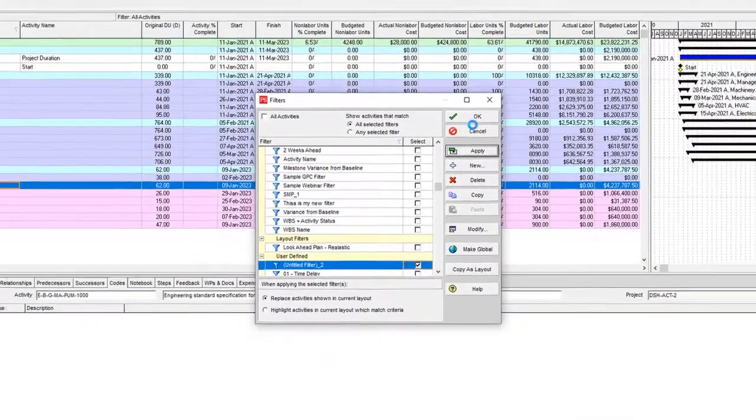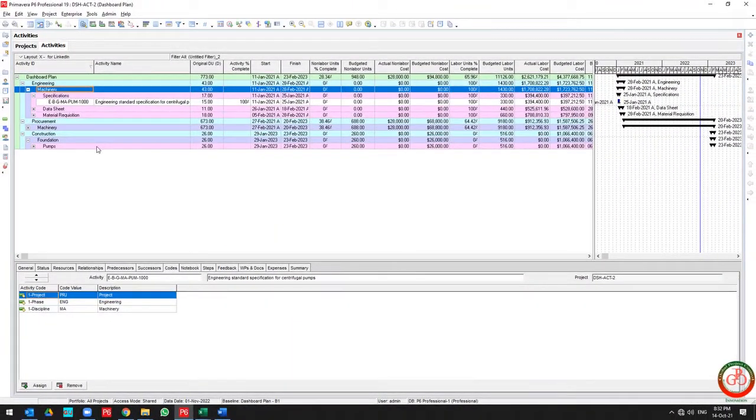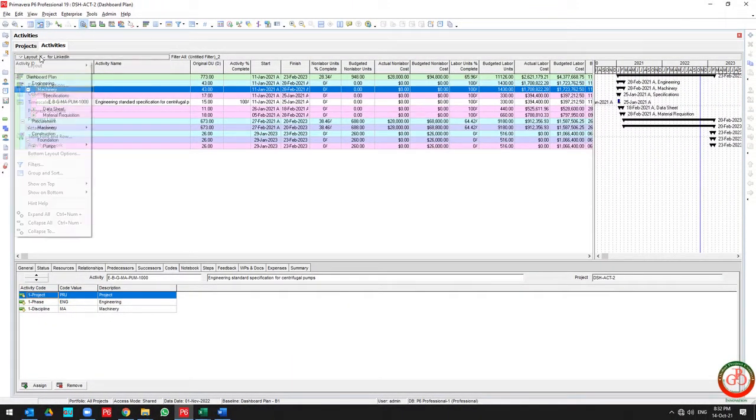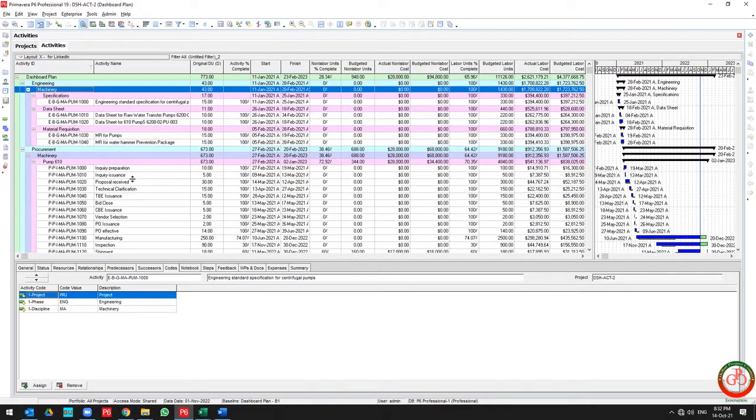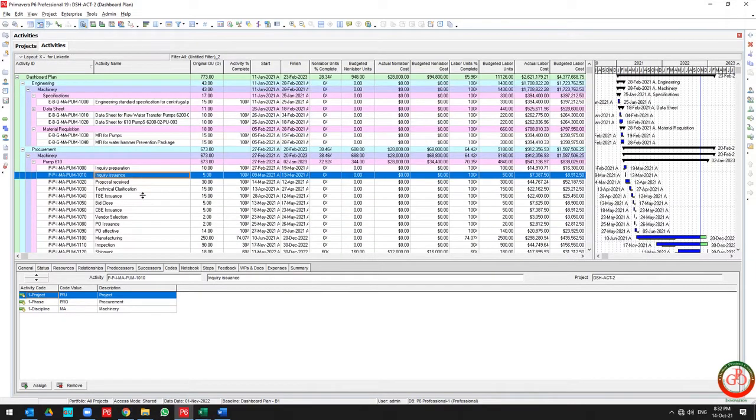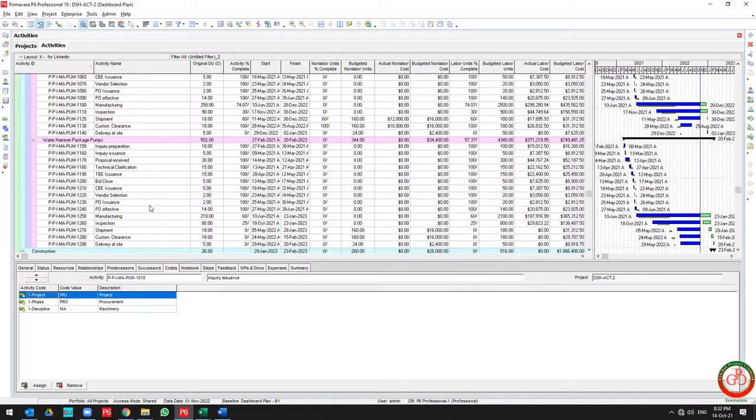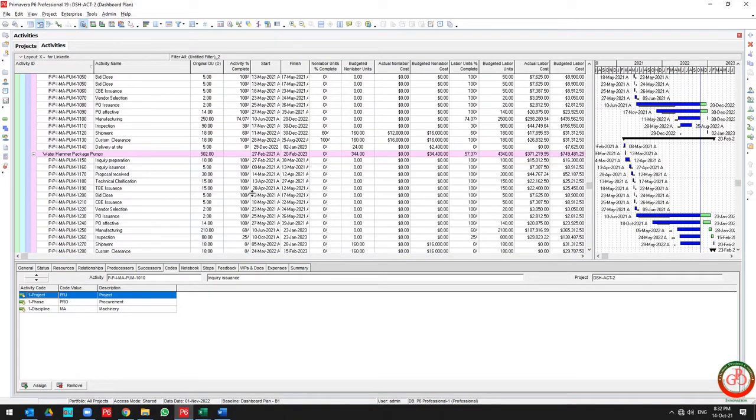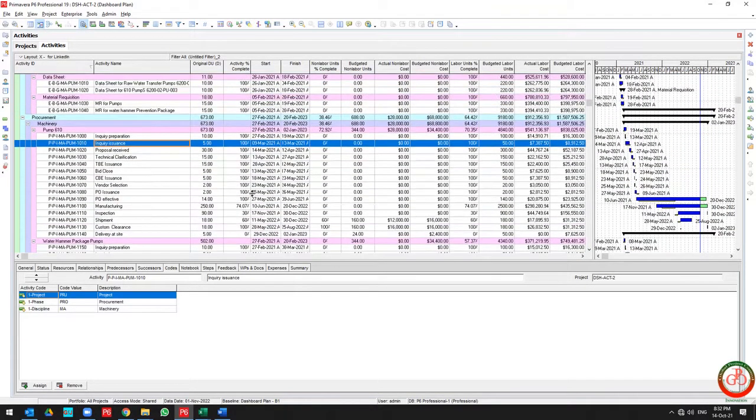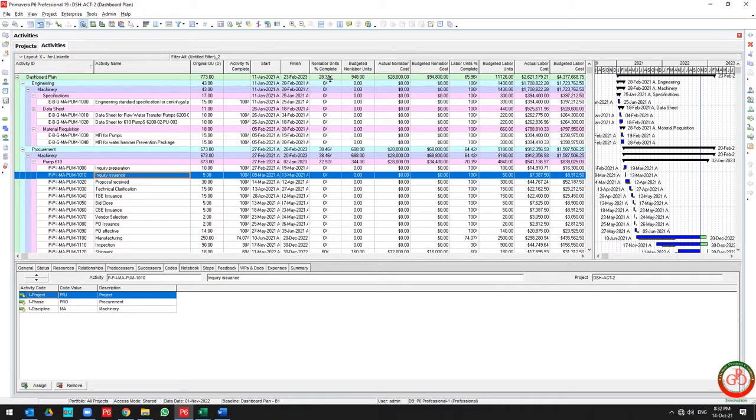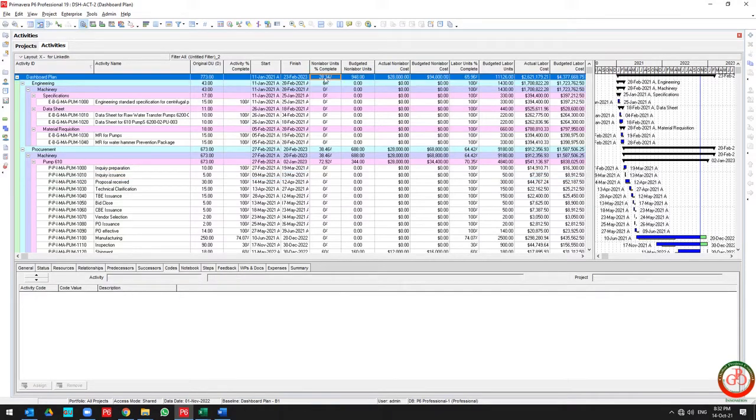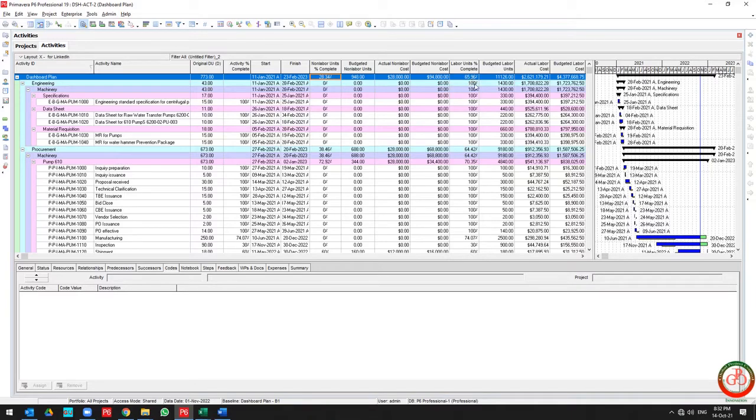Use the filter and apply it. Then all activities included in this discipline will be filtered, and I can report on them. My total progress for machinery is 28.34% in non-labor units and 65.96% in labor units.